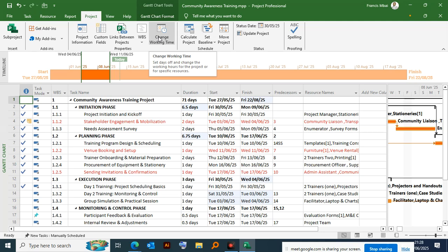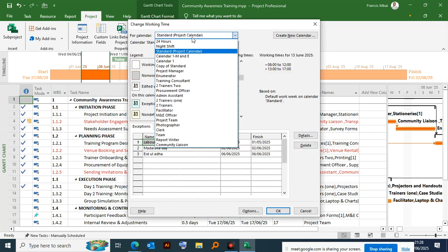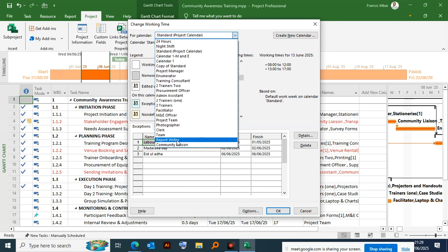Francis, you remember we tried to make the M&E manager not standard appear on the calendar on Sundays? I think something was off. So we can repeat the process. Probably we don't want to use what you call a base calendar. A base calendar is the standard calendar, and maybe we don't want to use our standard calendar, or maybe we have the project team. We can make it their own calendar.